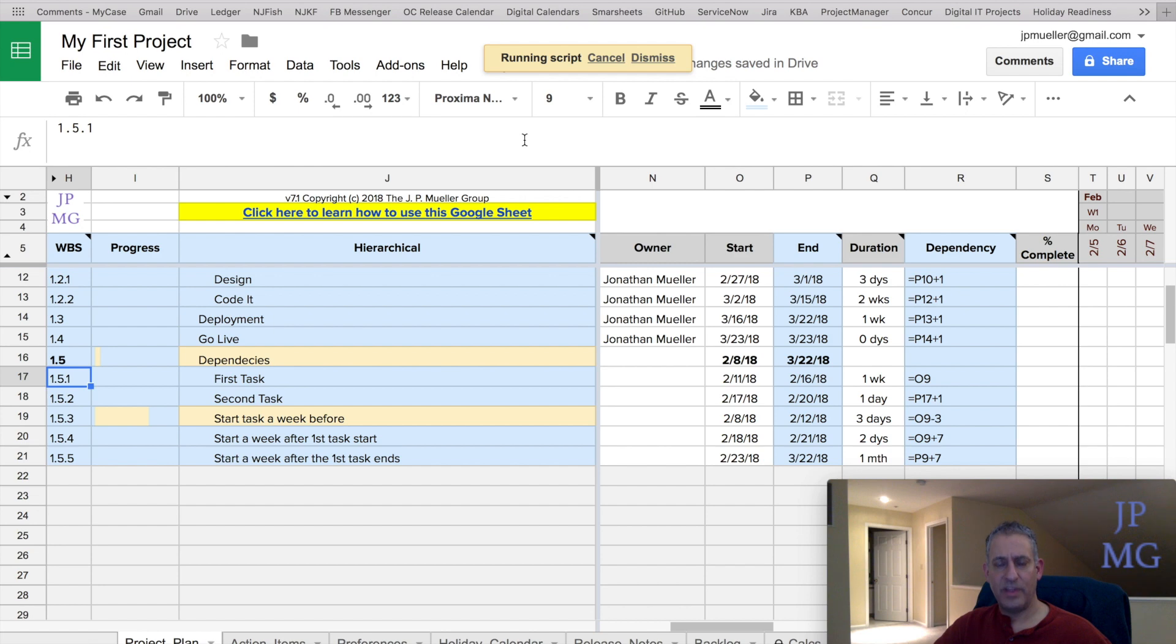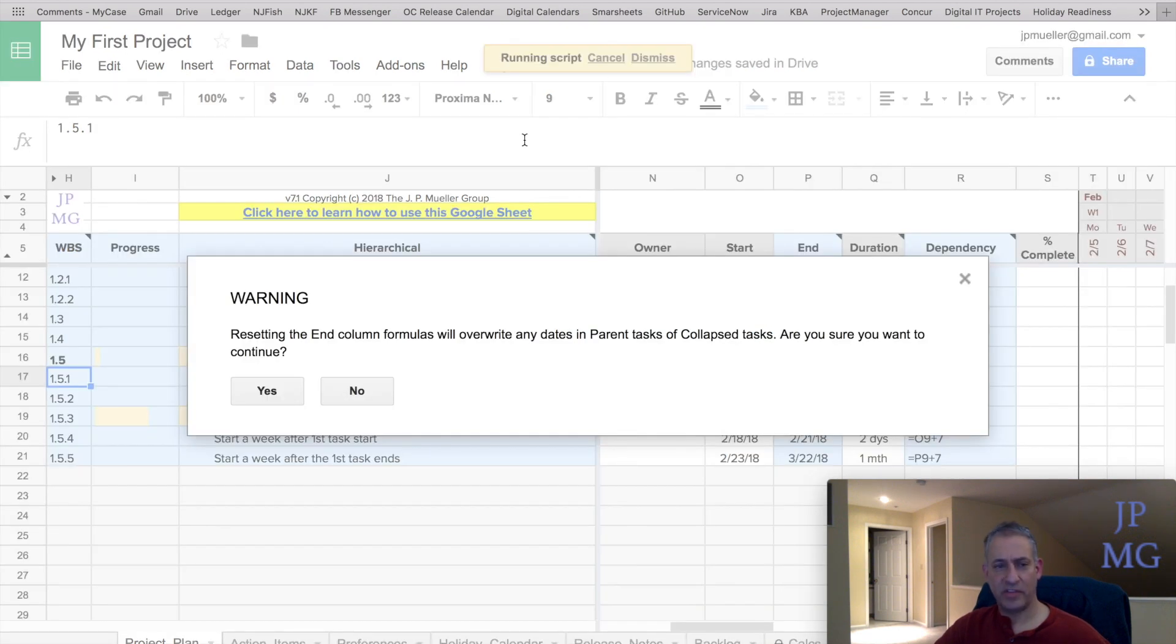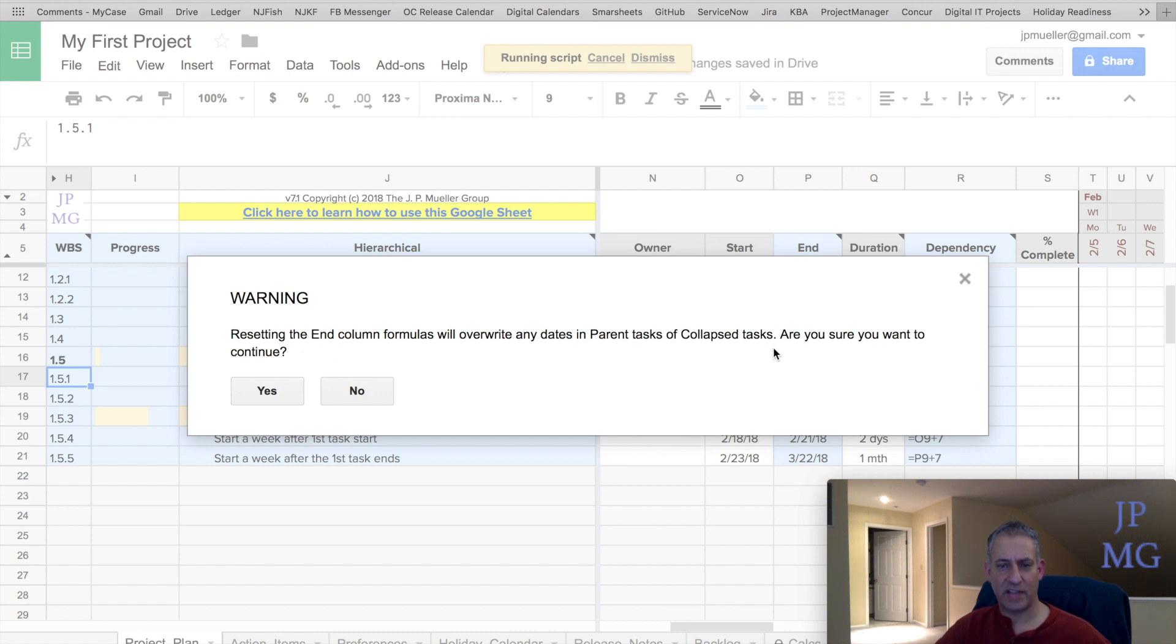I want to show you what you've got to be careful about. So when we did this, it fixes all the formulas except for the end column, and it stopped. And it asks you, resetting the end columns will overwrite the dates of parent tasks of collapsed tasks. Are you sure you want to do this?